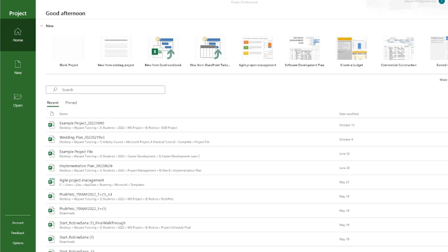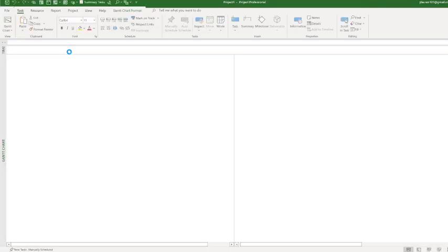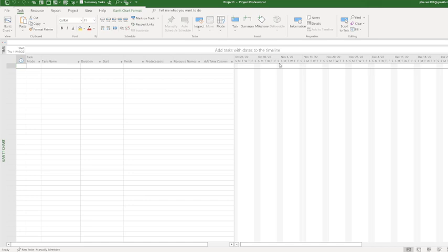But for this stream, we're just going to do a live Microsoft Project schedule build right now. So, of course, we're going to take a blank project. As I said, we're going to build from scratch because you're going to learn how to actually build it, not use a template. So, you're going to highlight blank project and just give it a second. Now, as you see here, everything is up. So, first things first, we're going to take all new tasks and change them from manual to auto scheduled. And that's going to help a lot.